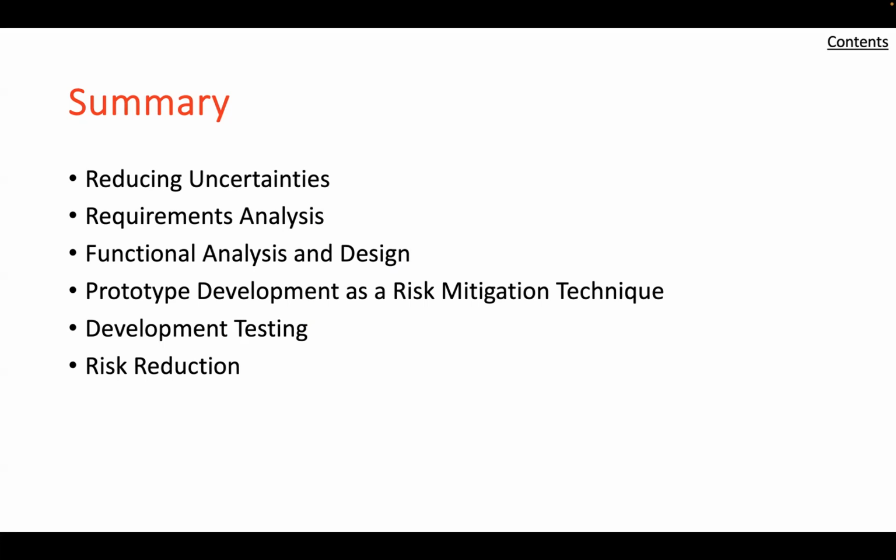Components that may require further development include those that implement a new function, or a new implementation of an existing function, use a new production method of an existing type of component, extend the function of a proven component, or involve complex functions, interfaces, and interactions.